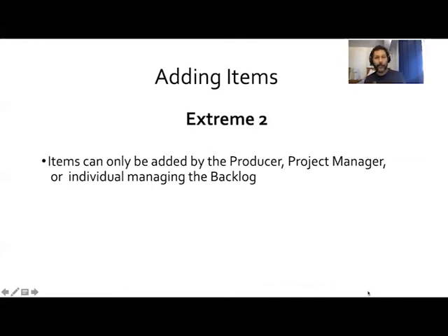That could be a producer, project manager, just whoever's tasked to do it and manage the backlog. Now, the problem with having everyone add to the backlog as a free-for-all is that it can be overwhelming. It can be very cumbersome. Things are being added without the team discussing it. It can become a very sloppy mess very quickly. And then you're spending more time maintaining the backlog than you are actually doing any work.